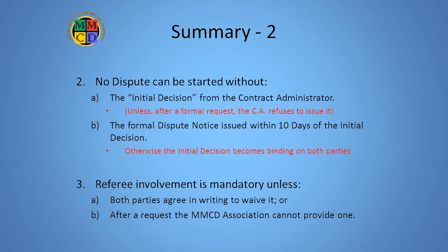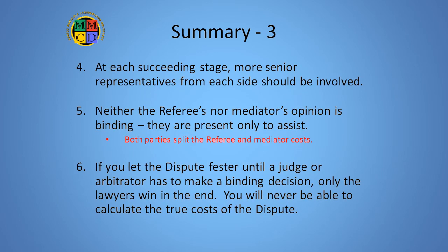3. Referee involvement is mandatory unless both parties agree in writing to waive it, or after a request, the MMCD Association cannot provide one. At each succeeding stage, more senior representatives from each side should be involved. 5. Neither the referee's nor the mediator's opinion is binding. They are present only to assist. Both parties split the referee and the mediator costs.